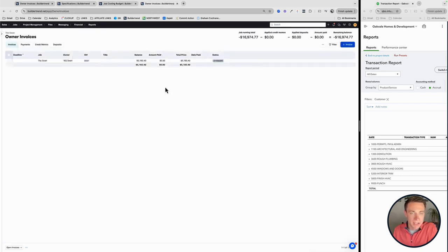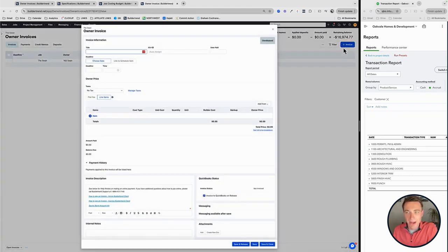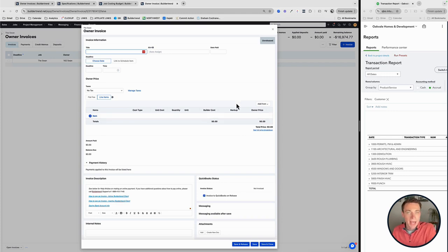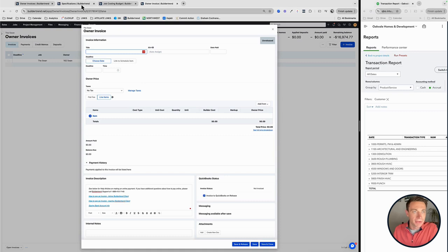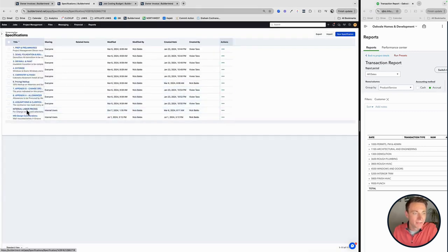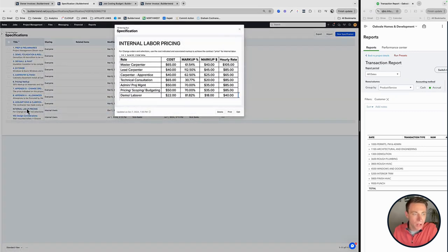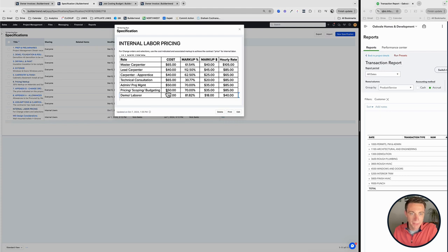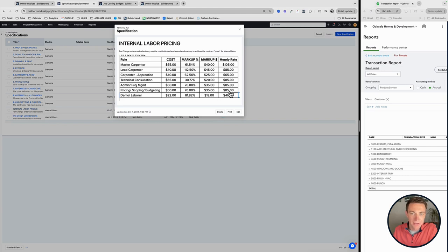Let's go to this other invoice that I'm going to do here. In this case, I just have my own time here so you can see this. And I put myself in at a $50 an hour rate. Now at a $50 an hour cost rate to me, what does that mean for my price? Well, I need to be some kind of role. So let's say that I was a, in this case, I'm a pricing, scoping, budgeting person, right? So I'm going to cost $50. I'm going to mark myself up 70% to get myself to an $85 hourly rate. I'm just going to use that example here.